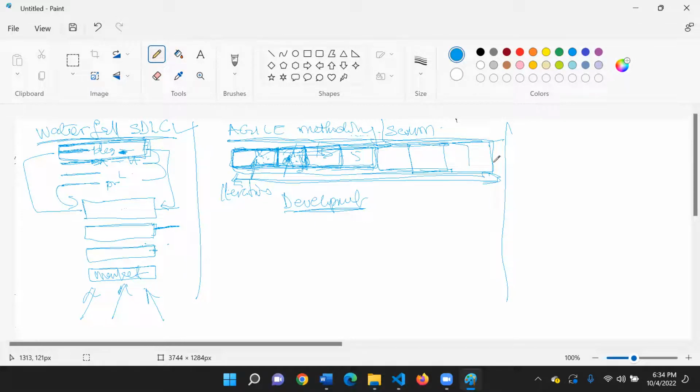It never stops. We don't wait for 5 years to get the foundation right before we go to develop. We are building, we are developing all the time. If there's any problem with the latest development, we'll resolve that, make sure it's fine before we move to the next one. But we are building anyway, right? In iterations. And then that's 2 weeks. But the Scrum Master would manage the development team to work according to this.